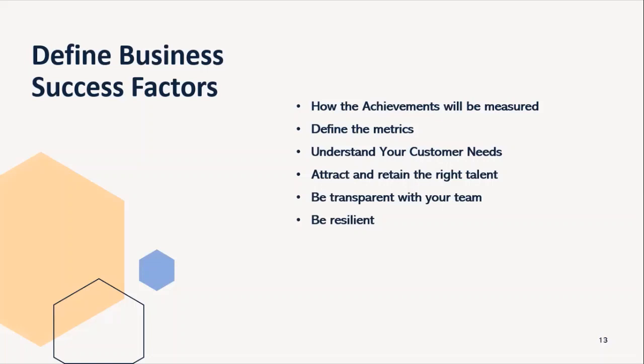So when you consider the success factors for your organization, for your team, for your project, you should keep them to a minimum to achieve your objectives. Minimum 3 to 6 is the best number. The variables are used to align the project sponsor, executive stakeholders, and the project team on what project success will include in the early stages of the project. So these are two things: number 1, define the goals, and number 2, define the business success factors.